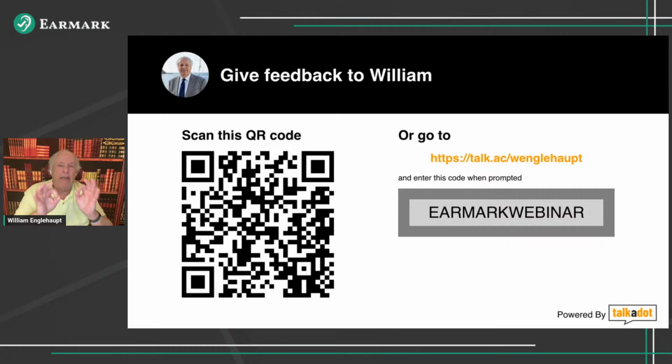The third thing that I found is really helpful. And we talk about, and some of you may be familiar with the concept, and it has different terms to it, but they call it the live review, which is an opportunity for the individual to present the work that they've just done to all the reviewers simultaneously. And it gives them the opportunity to talk among themselves and to agree on what those 2 or 3 or 4 or 5 things are.